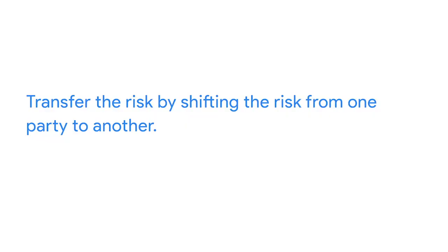For example, you decide to hire the contractor with a reputation for missing deadlines because you know they do great work. In this case, you might create a quick flowchart that visualizes the risks and potential options for addressing it, like checking in with the contractor daily, either by email or through meetings. Ultimately, you might then choose to have daily check-in meetings with the team to ensure that they're staying on top of their tasks. Finally, you can choose to transfer the risk.